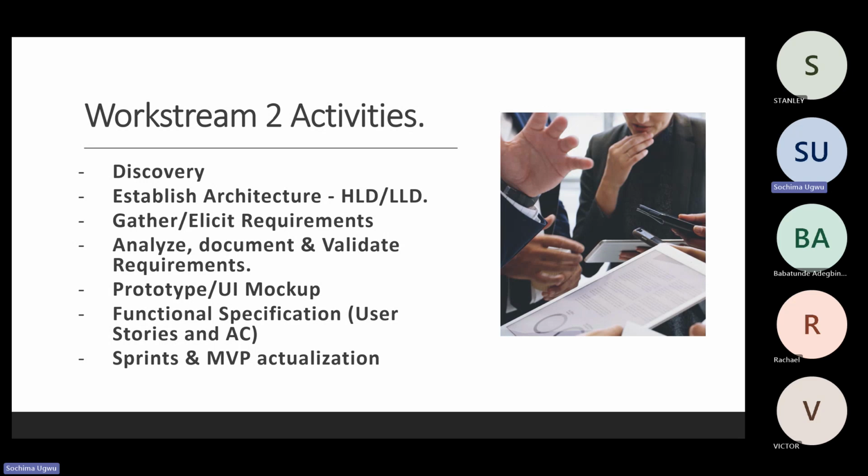So we might decide to say, you know what, let us follow up with the MVP to rebuild or rebrand the customer application, the form application. So we're going to put all our resources into achieving that, and that might take us like 2 to 3 sprints. So all those kinds of conversations will come in. We'll do our sprint planning and all other scrum activities, and essentially we start the production, and hopefully after a couple of sprints we'll be able to achieve one MVP, right?